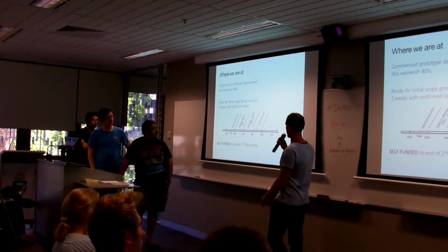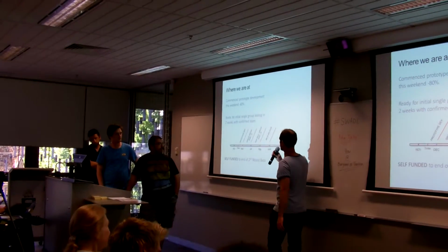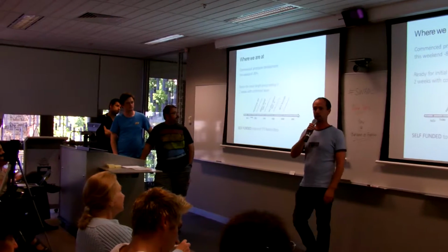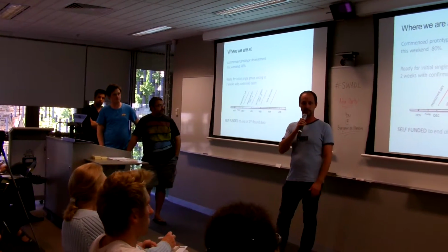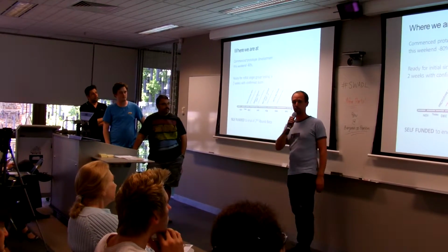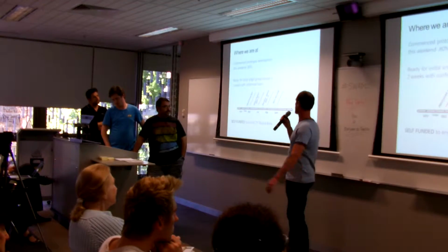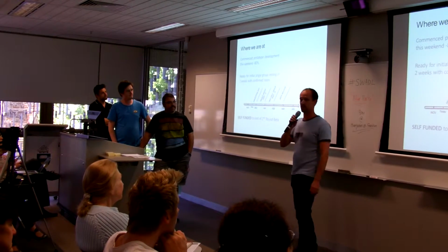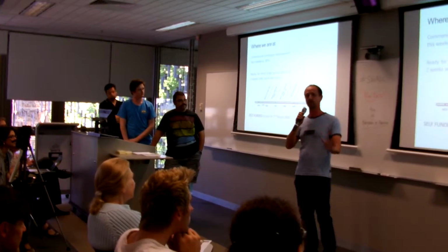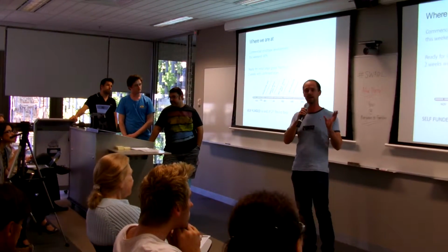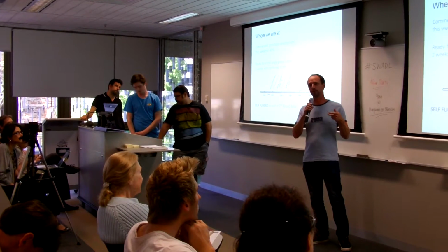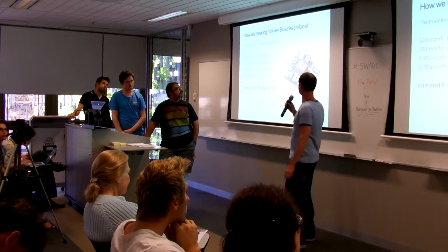From a general project plan perspective, December will be the single group test, so one team, and then through January we want to identify 3 to 4 clubs that have multiple groups, so we can do some specific testing around that, such that for February we're ready for beta release to the market. Also, the good news is we're self-funded, so we're going to do all this ourselves. We're not initially after funding, but we want to understand the market, understand the product, and refine it through an iterative approach, learning cycles, etc., to get ready to go to market.